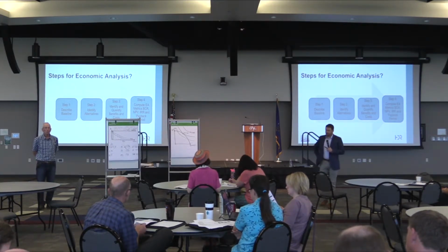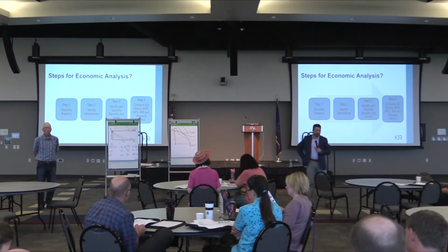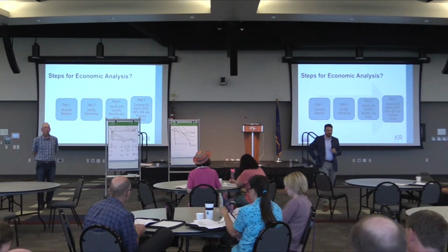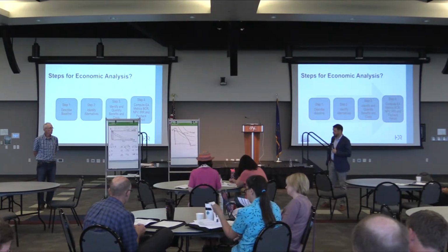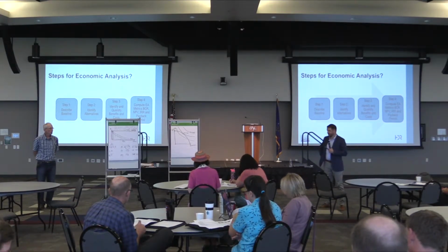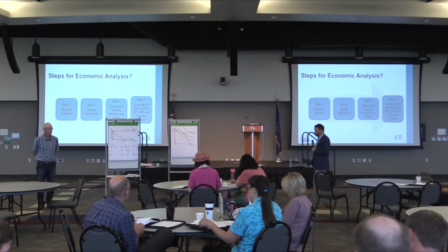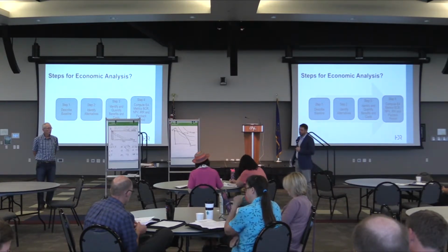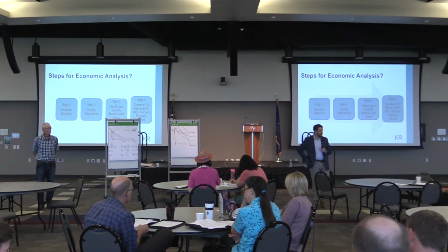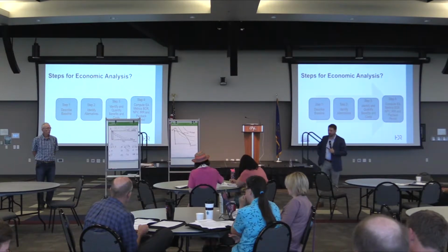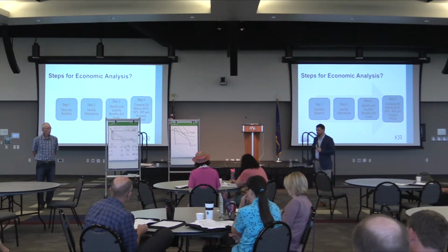Quantifying, again, getting back to what Jay was saying, we go through and inventory the damages that would be reduced with, say, a project. If you're doing agricultural damages or urban floodwater damages, you'd be looking at some kind of hydraulic analysis to evaluate where the flooding occurs under a baseline condition. What alternative could be used? Is it channel improvements? Is it a retention basin?